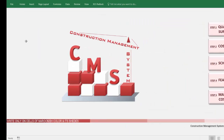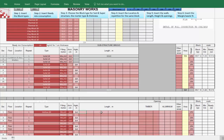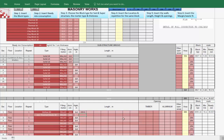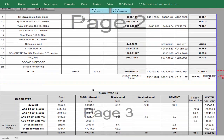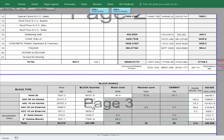The same can be done for masonry work very easily — choose the type and insert the height and length of the block. Whatever the block type, just choose it, and also choose the mortar type. CMS will give you directly, for each type of block, the required area, the number of blocks, and the quantity required as mortar. This is reflected in the material takeoff showing all block types, block areas, block quantities, and required mortar material — whether ready mortar or site-mixed with sand and cement — all coming automatically.